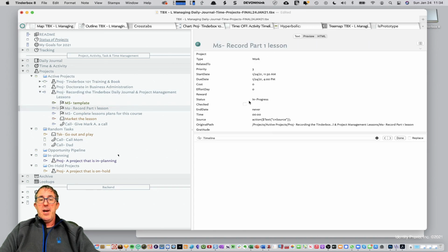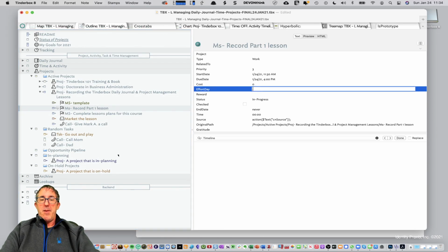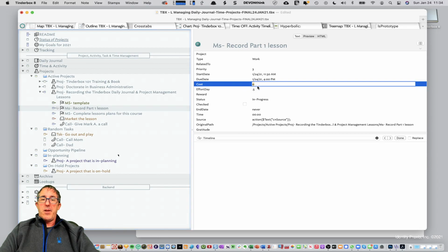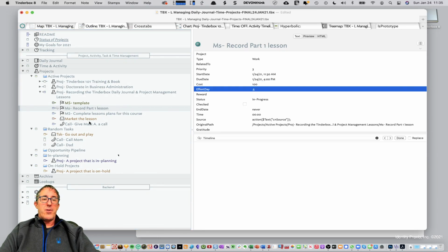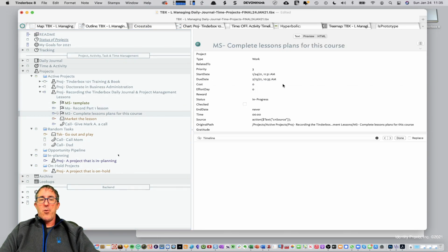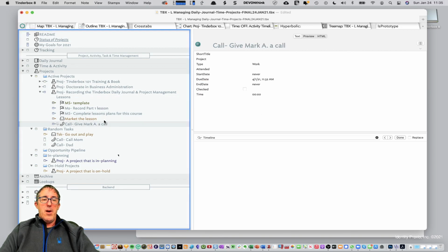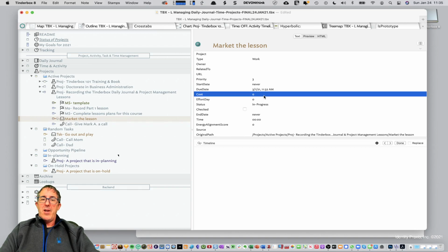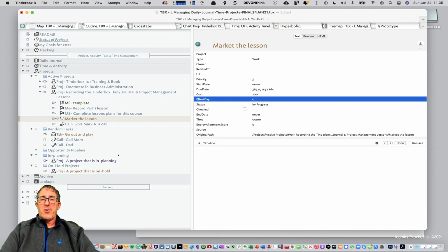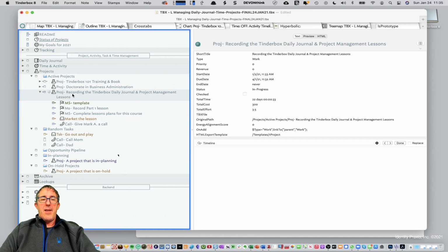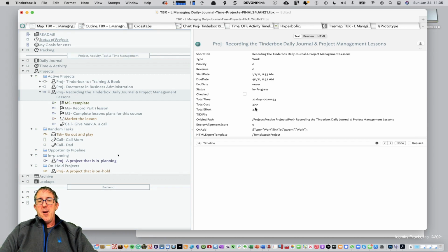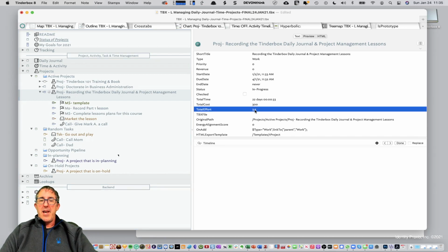So let's say the recording of this lesson, from an effort standpoint, is going to take me about 0.5 days. The cost, let's say, is about $100. Let's say completing the lesson course plan is going to take me about 3 days. Cost will be 0. And let's say marketing the lesson is going to cost me about $200. So now if I look at the project, you'll actually see $300 in 3.5 days, or whatever metric you want to be putting up.